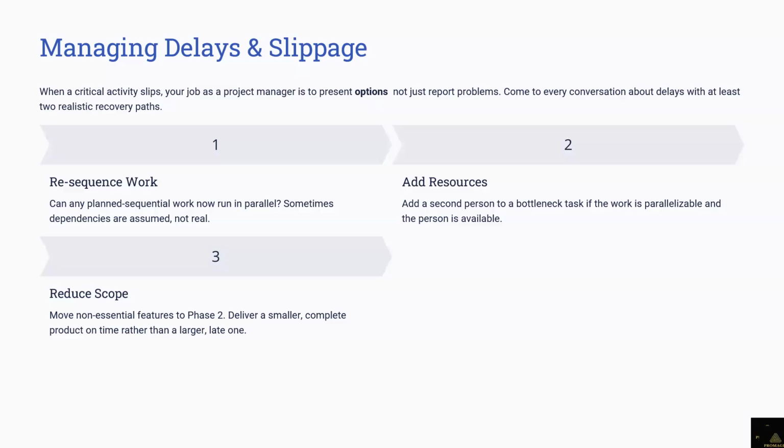So the stage you build the house to such that your client can come and start living there, even though the house is not yet finished, is what you call your minimum viable product. So you can use that intent also. Okay, we can do it this way, take this out.